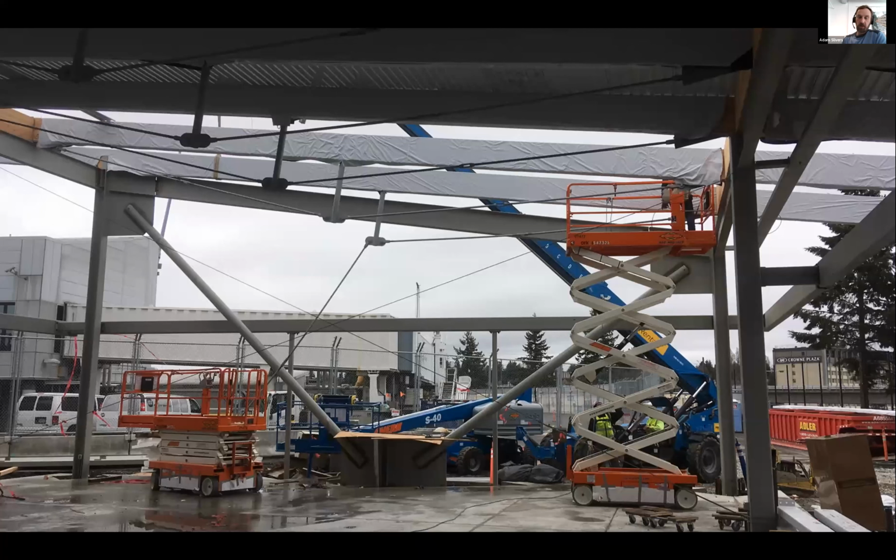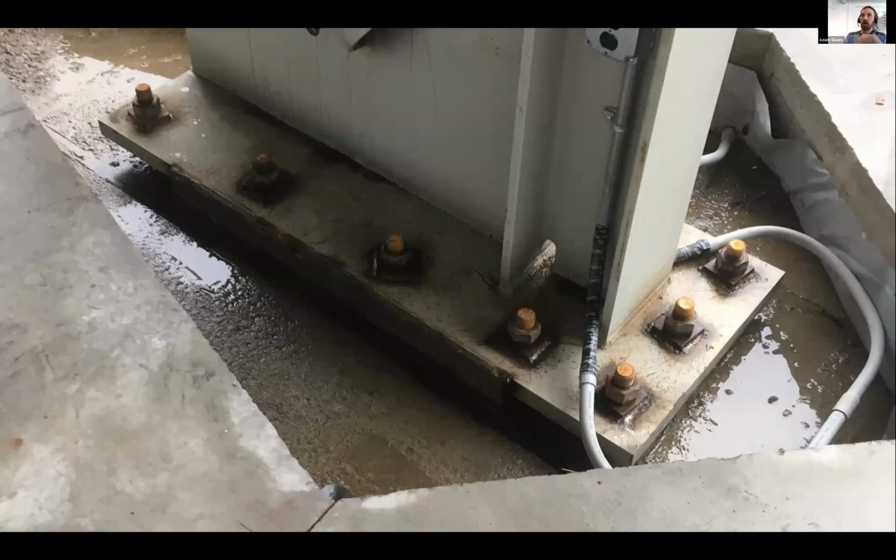We had polished concrete on this project, with a lot of carpeting in the waiting areas. I just recently talked to the concrete foreman for Walsh Group, Steve Santos, and he said the finishers had a little heartache, but it would have been nice if we had some fly ash in there to create a little more fluid in the mix, because slag can be sticky. But overall, it was pretty successful, and with the column pockets, having those slabs poured later after the foundation was cast allowed the steel to go up without any limitation on the concrete pouring and the set time.